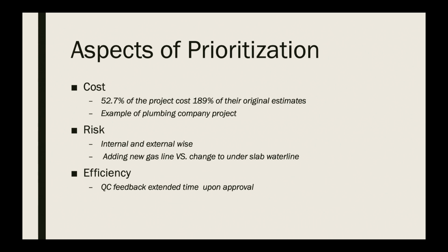The second change is to add gas lines design for each of the houses we do. One advantage of this change is that it will enlarge the range of our service. The downsides are that a lot of plumbers already know the process and locations for adding gas lines in a house. They don't need a paper-based blueprint to tell them what to do. Besides this, doing gas line drawings would require engineers in the CAD department to spend more time learning how gas lines run in a house, the restrictions, and figuring out the way of creating blueprints. For these reasons, comparing these two requirements, the first one has a lower risk but higher benefit, so the first one was prioritized.